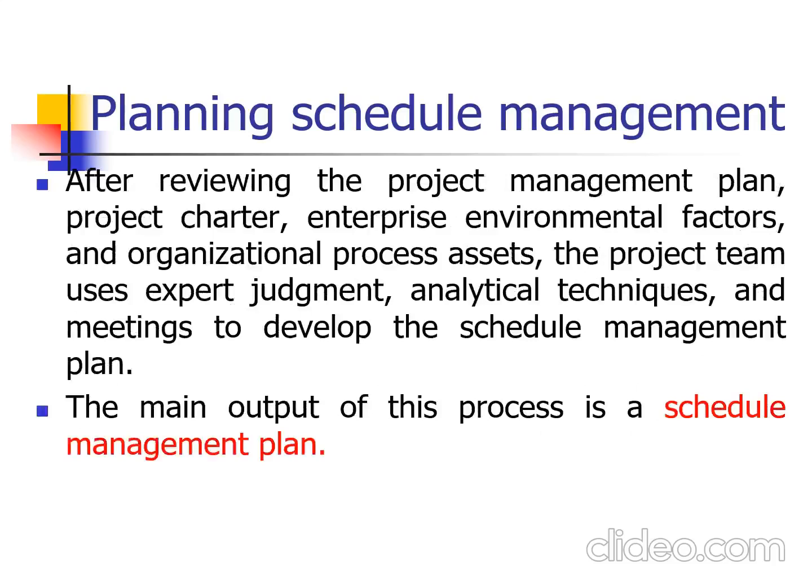So after reviewing the project management plan, project charter, enterprise environmental factors, and organizational process assets, the project team uses expert judgment, analytical techniques, and meetings to develop the schedule management plan. And the main output of this process is a schedule management plan.